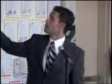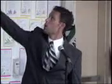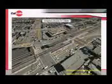Okay, so San Mateo, and you'll see in later slides, ultimately will get moved immediately to the south of its current alignment. What that allows us to do is essentially build San Mateo right next to the existing San Mateo. And when we're working on existing San Mateo, we'll run traffic on new San Mateo and vice versa. The same thing will happen at Angus. Those of you who know the street or came up here today will notice there's a little jog as you hit First Ave. We're going to correct that and connect the dots, if you will, on Angus. So same thing on Angus. When we're working on existing Angus, we'll allow you to drive on proposed Angus and vice versa.